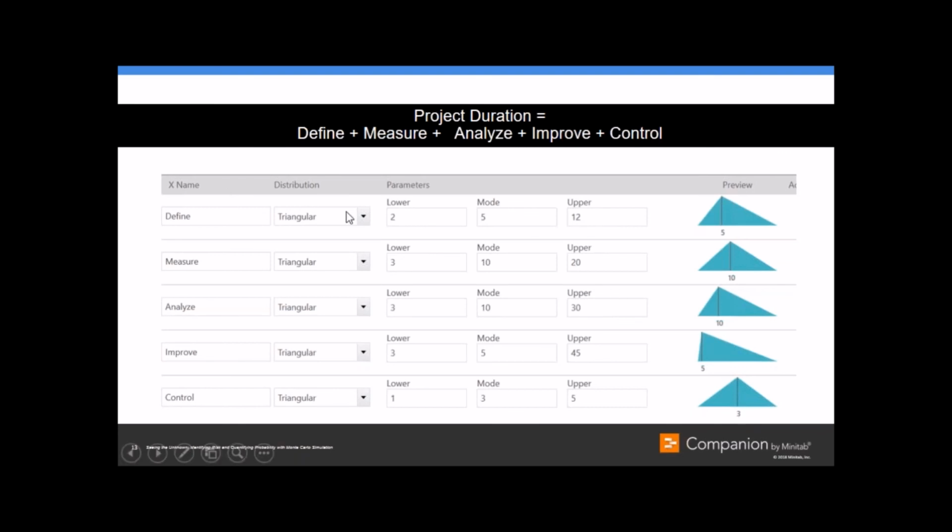Okay, so now I have my equation, I have my inputs, and I have some uncertainty for these inputs. What Monte Carlo simulation does is randomly select an item from each one of these steps of the process, plug it into the equation, and see what I get. I'm going to do that 10,000, 50,000, maybe a million times, over and over. This idea of repeated sampling gives a good idea of the worst case, best case, and average. What kind of results might I expect for that process? That really is what Monte Carlo is.